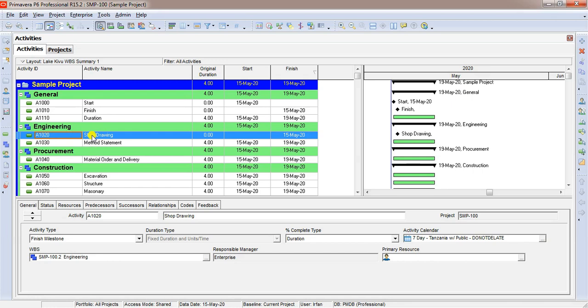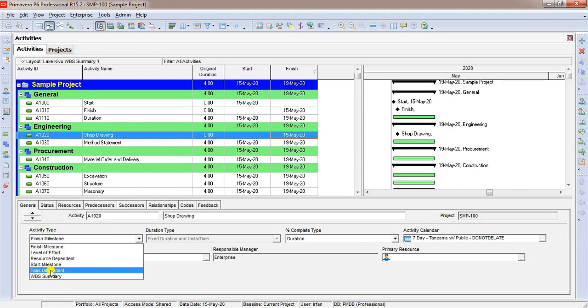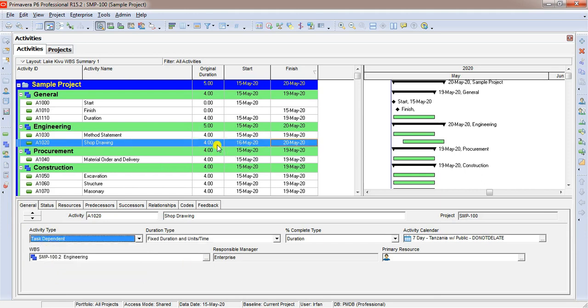We have an activity called shop drawing. If you notice this activity having zero duration and only finish date. You remember this? What is this? Yes, I think you got right. This is finish milestone activity. We need to change this activity as task dependent. We will follow the same. We will select task dependent. Did you notice what happened? Yes, the duration is changed and set to 4. Four duration is by default.